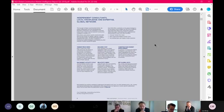Yeah, so RLB are in the market. This is what they do for a living. They are cost consultants, project managers. So their day-to-day life is acting on behalf of clients, issuing tender documentation against specification, bills of quantities, negotiating with contractors to arrive at actual build costs for particular different projects.